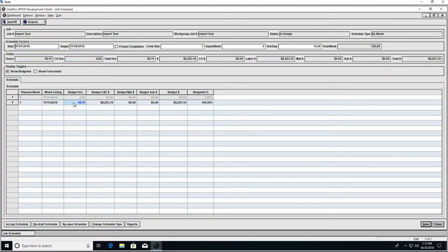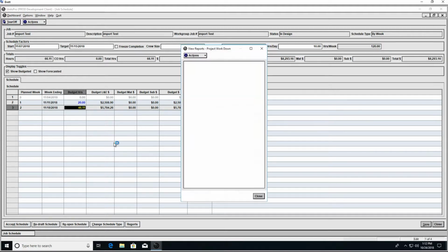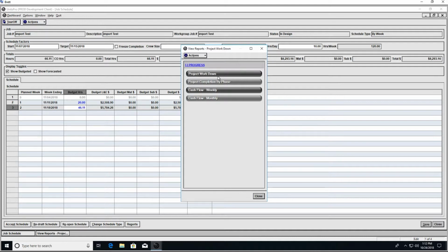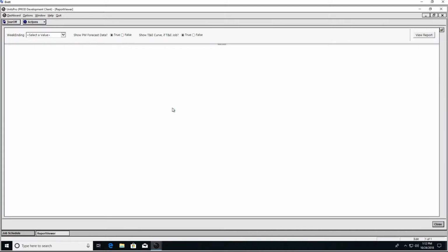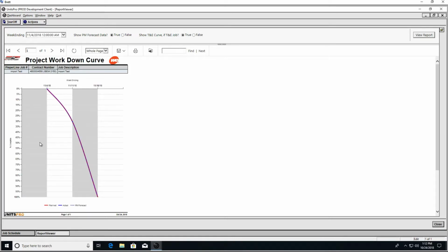So we've got 66 hours here, and we're saying that we're running 120 hours a week per crew, so it only puts it in at 1. If we wanted to say, hey, we're going to start this on week 1 and complete it in week 2, we can go ahead and do so. Save it. And then there's a quandary of reports. This also pushes to a whole scheduling infrastructure within UnitsPro, where we can take a look at sequencing the jobs by foreman and therefore laying this all out.